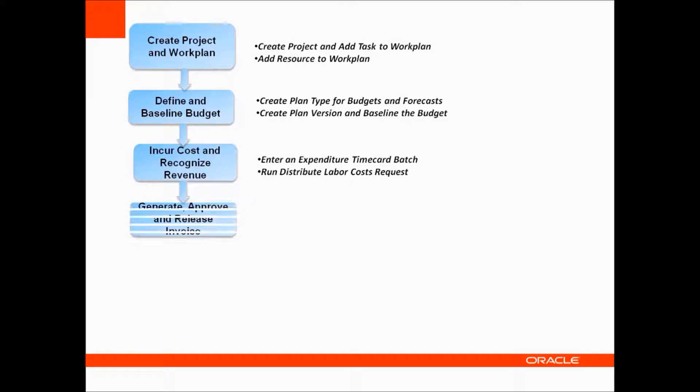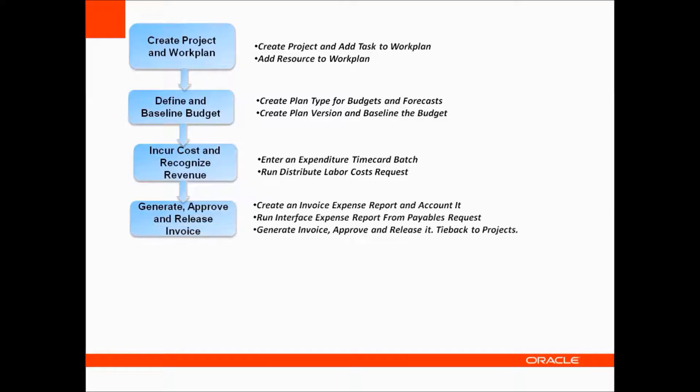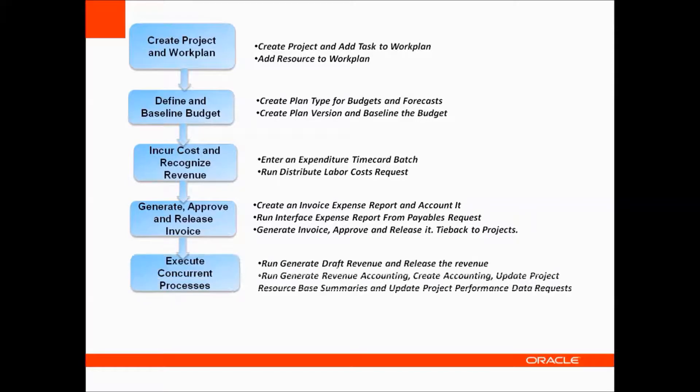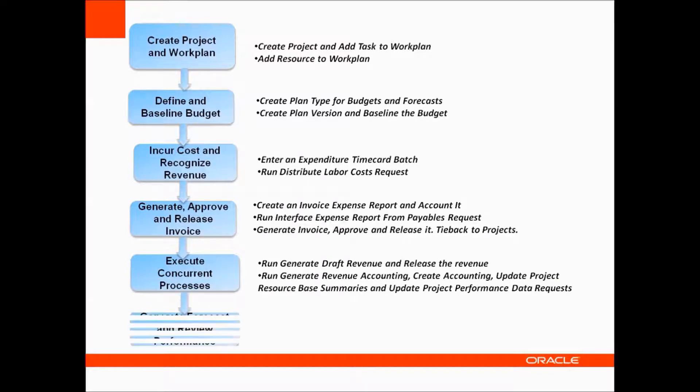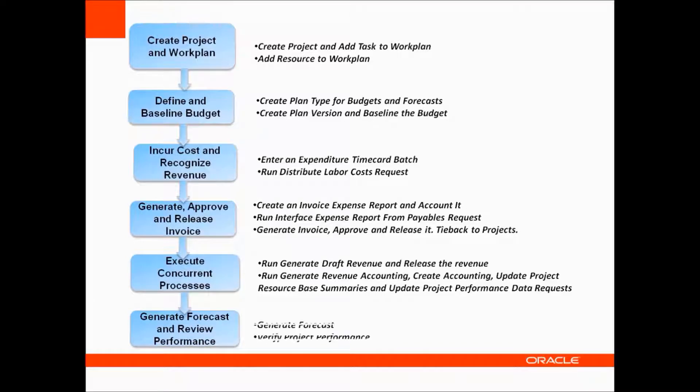Generate, approve and release invoice, Execute concurrent processes, Generate forecast and review performance.